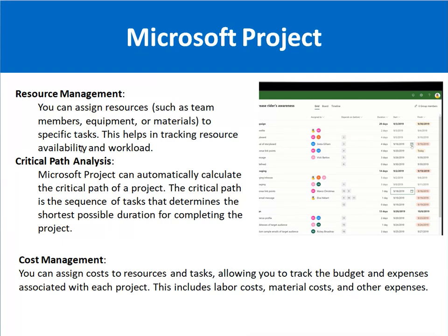Also the critical path tells you that the tasks which are on the critical path are the most important. If there is any delay in those tasks which are on the critical path, it will definitely delay the project as well. And if those tasks which are not on the critical path are delayed, that means the project will not be delayed. So that is basically the concept of a critical path. So rather than creating the critical path manually on a paper sheet, you can use Microsoft Project and it will automatically create the critical path.